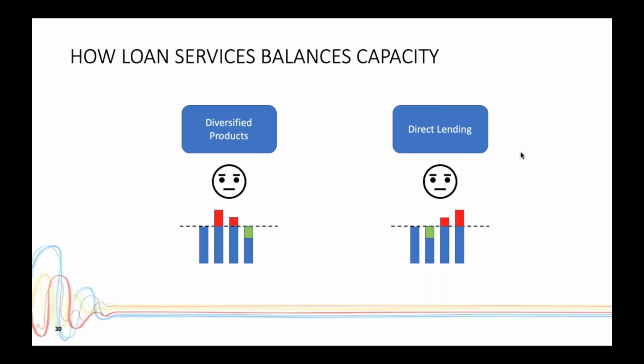So they line up their deadlines, and so they see what's on their plate, and then they say, well, who's in the office and who have we got? And they evaluate what kind of workload each person has. So if you imagine these little bars here as people, staff, and you see some people are overloaded and some people are underloaded and have a bit of capacity to give. So they do a little bit of horse trading within their teams, and they smooth out the workload so that everybody is fully utilized but not overutilized, so that the work is really balanced.